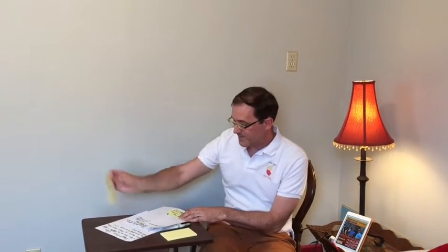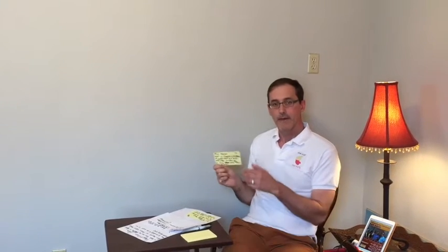Okay, and then this other story is: as a reader, with chapter 1 up to the first break, I want words that are brief and clear and meaningful so that the prose flows into my brain. Okay, so this is using the Bill Wake format. The most traditional format is "As a, I want, so that," and there are some other little tricks you can do to shorten that a bit. So you can say, as a reader, I have something, what the reader wants, as if they have it, and then why. So it just shortens it up a little bit.